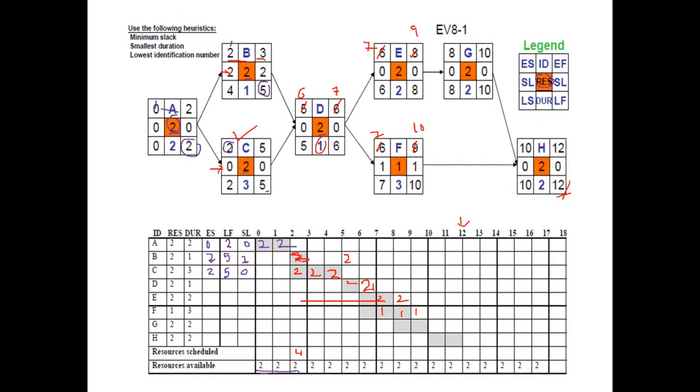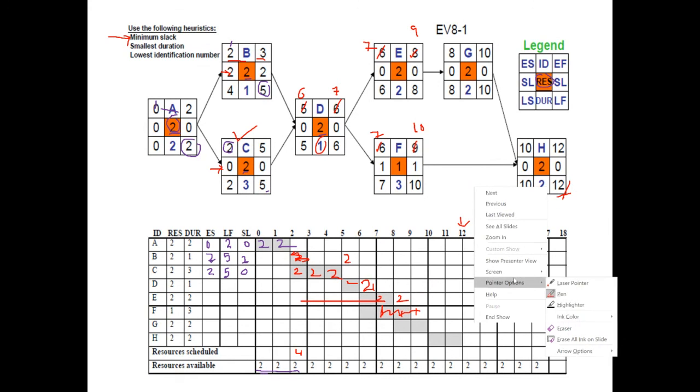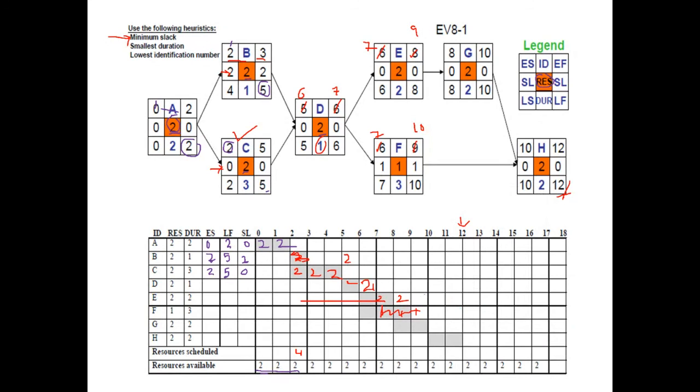So there's a suggestion that we prioritize E, again using the heuristics. Now the first of the heuristics is give priority to activity with minimum slack. So we have decided to go with E, which means that unfortunately F is not taking place here. So after each, we have to go through iteration again. So that is clear. Now once we have done that, then we have a choice. Either we could begin work on activity F or G.